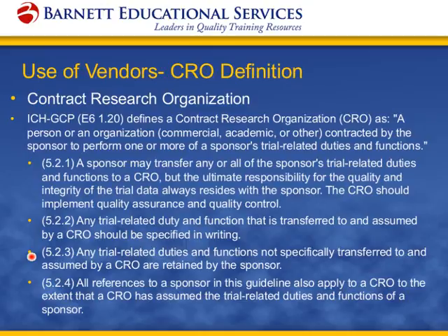So again, one of our pitfalls is not really spelling out in detail what we mean by those tasks. One example that I ran into between a CRO and a sponsor was that the CRO had been delegated the monitoring, the project management, the general oversight of the trial. But the sponsor retained the safety piece. The medical monitor was a direct consultant with the sponsor. And what ended up happening when we did the final audit of the trial master file being maintained by the CRO, they did not maintain correspondence from the medical monitor to sites. And again, the question is, well, that was correspondence. That should have been in there.